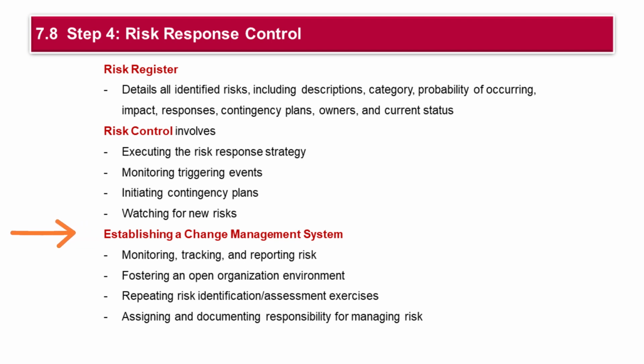aspect of risk control. Project managers must continuously monitor risks alongside project progress, incorporating risk assessments into status meetings and reports. A study by Thamhain, 2013, found that over half of the contingencies in major product development efforts were unforeseen, underscoring the need for readiness to handle unexpected issues.